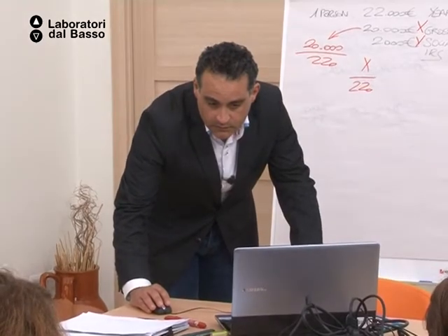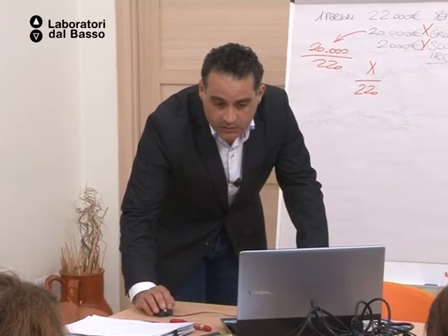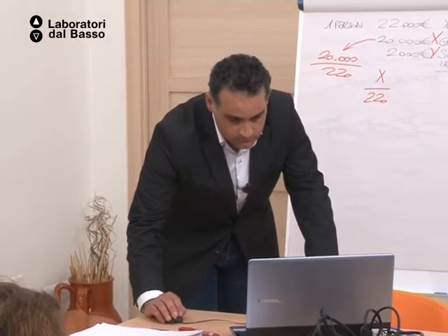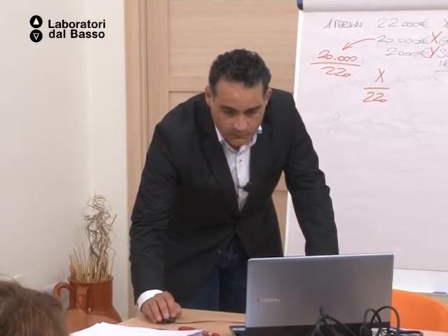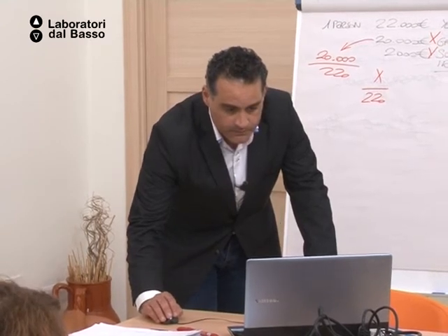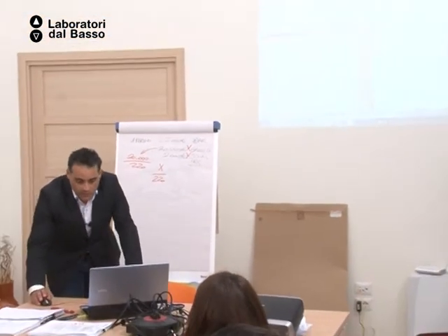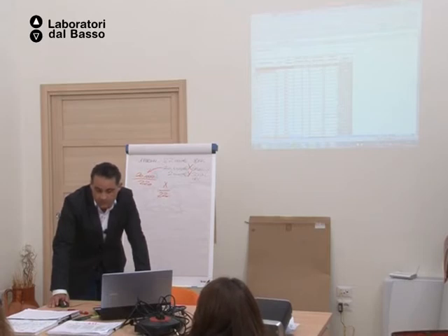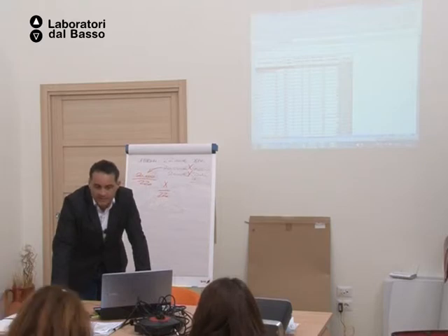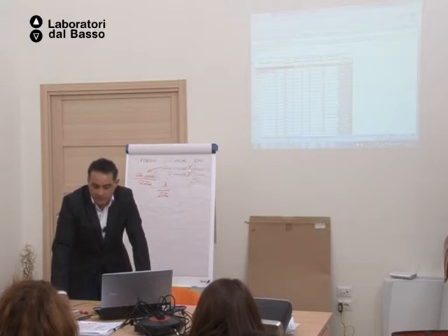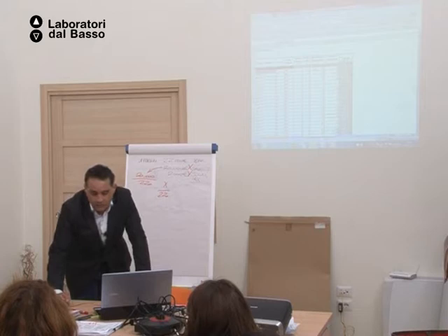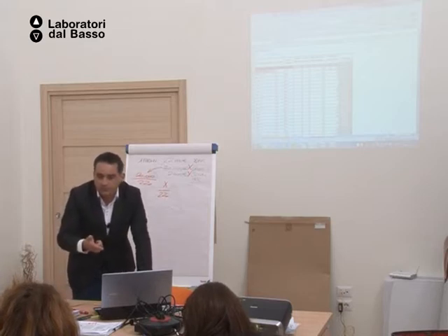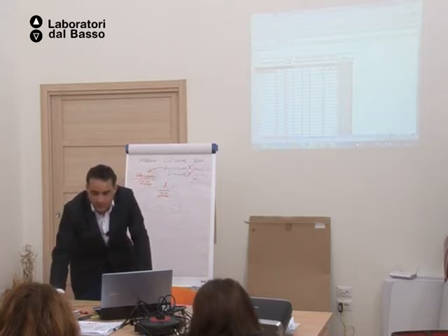you just fill in again according to number of persons, number of days, but it doesn't mean you cannot do otherwise. Okay? So you'll get something like this. Well, you have one person at all times, all four trips, who will stay 4 days each time, and the maximum subsistence cost that this person will be considered to use will be 232 euros, and we estimated that the average price for the return journey after the trip is 350 euros. Okay. The last column, the column J, will give you totals.